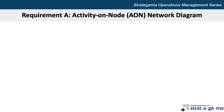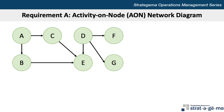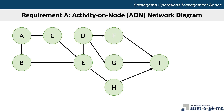Let's start with requirement A and draw an activity-on-node AON network diagram. From the table provided, activities A and D have no predecessors and are therefore starting points for their respective paths. Activities B and C come right after activity A. Activity E can start after activities B, C, and D are complete. Activities F and G can begin after activity D is complete. Activity H can begin only after activity E is complete. And the last activity I can begin after activities F, G, and H are complete. This is now our completed diagram.